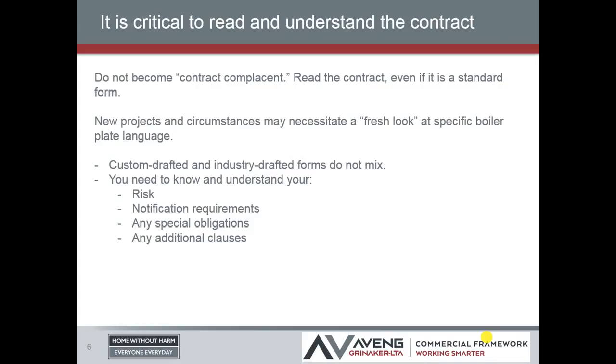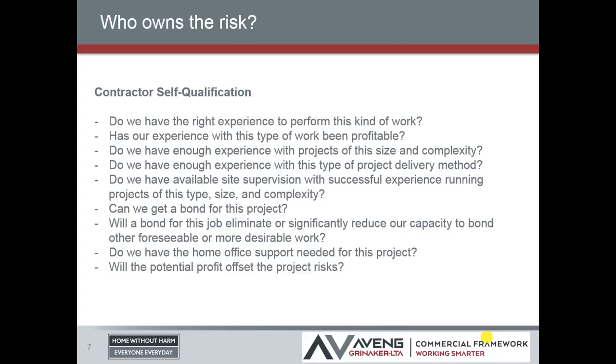contract. I really feel strongly that custom drafted and industry drafted forms do not mix, and you see it so often in our industry where clients will get legal eagles to amend standard forms without really fully understanding the consequence of that amendment. You need to know and understand your risk, what the notification requirements are, any special obligations that an amended form has placed on you, and any additional clauses. And you've got to disseminate that to your team. You cannot assume that people understand or know those.